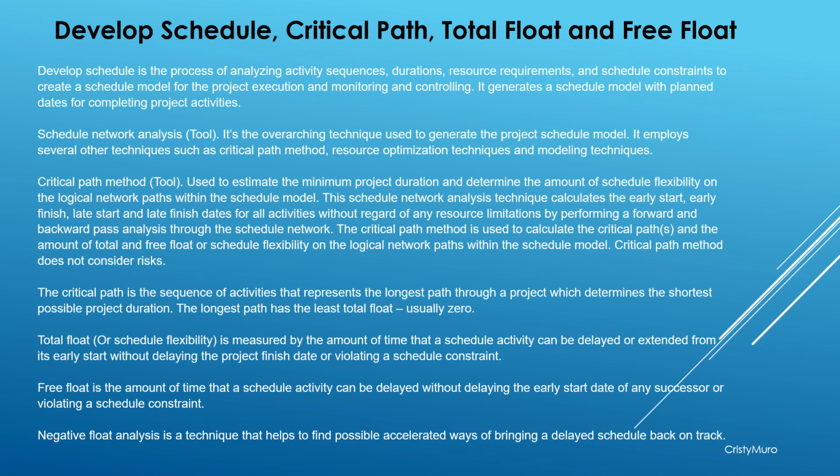Free float. The free float is the amount of time that a scheduled activity can be delayed without delaying the early start date of any successor or violating a schedule constraint. Negative float analysis is a technique that helps to find possible accelerated ways of bringing a delayed schedule back on track.